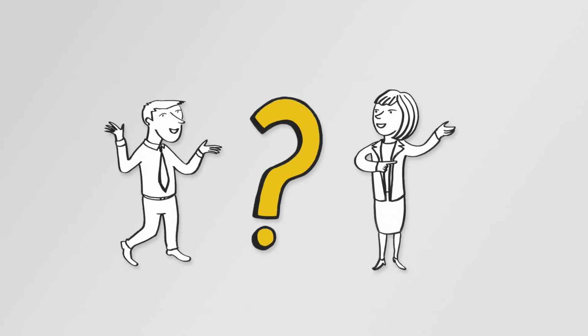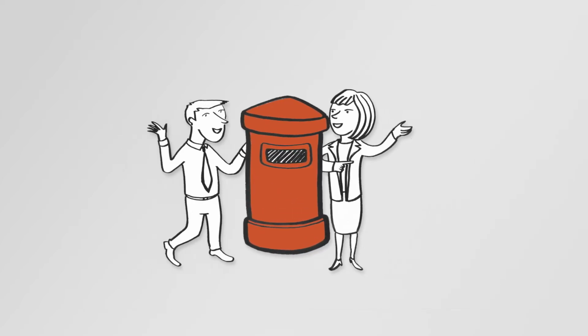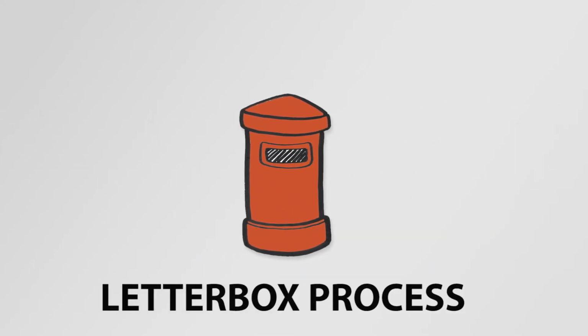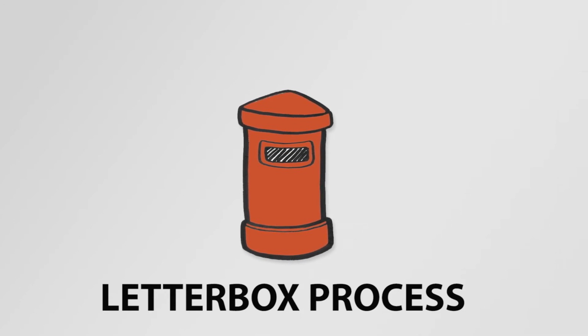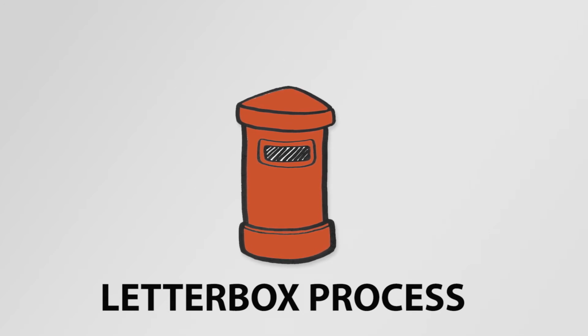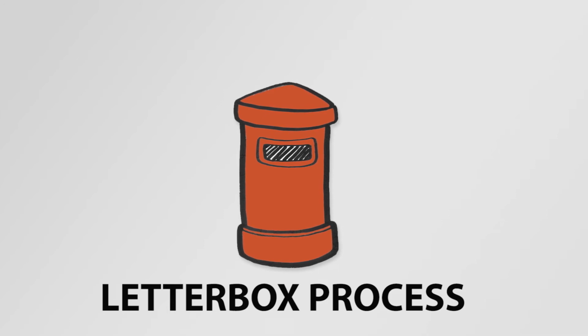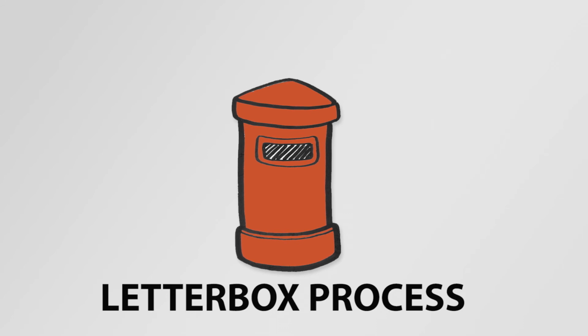We realise that not all work you need doing from IT warrants a full business case or the above process. The letterbox process is used to ensure that while large projects continue unimpeded, we can also deliver small-scale change in a timely manner. This work is delivered utilising downtime when core projects are blocked, delayed, or wherever natural ebbs and flows in demand for specific resources exist. Your IT business partner will be able to guide you on what we can achieve through the letterbox process.